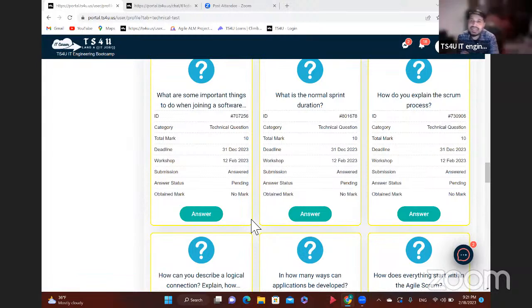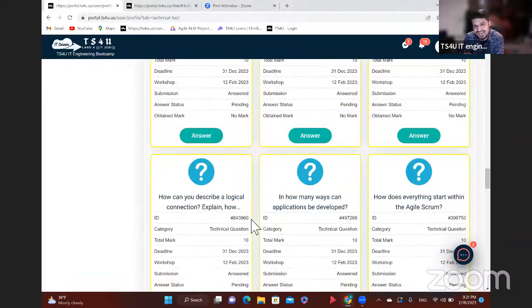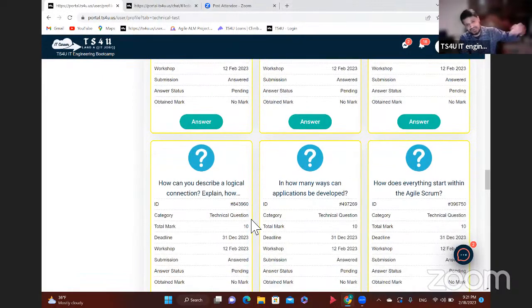So yeah, that is true, but we cannot use the typical wording here. "They let the software engineer know." No, that's not the way. The business gives requirements. That requirement has to be written in a well-defined format. It needs to come to our backlog, and then we need to estimate it, and then the backend engineer writes the code. The business does not directly tell the developer, because the business has to follow a process.